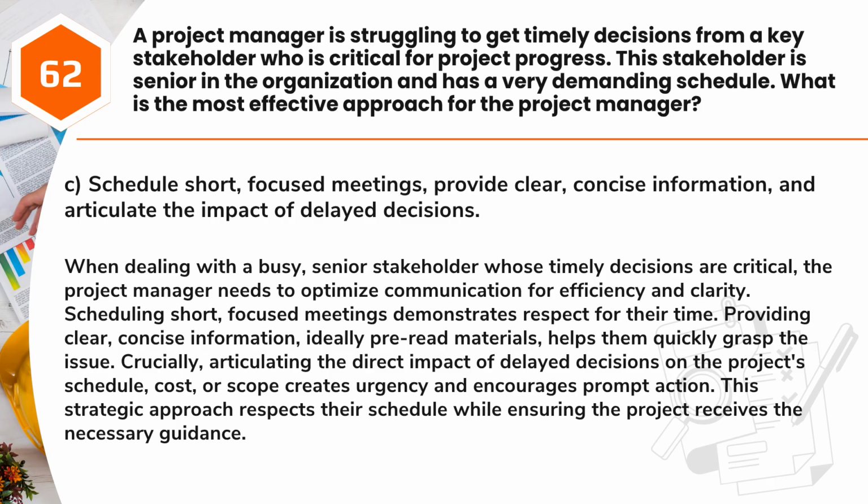Providing clear, concise information, ideally pre-read materials, helps them quickly grasp the issue. Crucially, articulating the direct impact of delayed decisions on the project's schedule, cost, or scope creates urgency and encourages prompt action. This strategic approach respects their schedule while ensuring the project receives the necessary guidance.